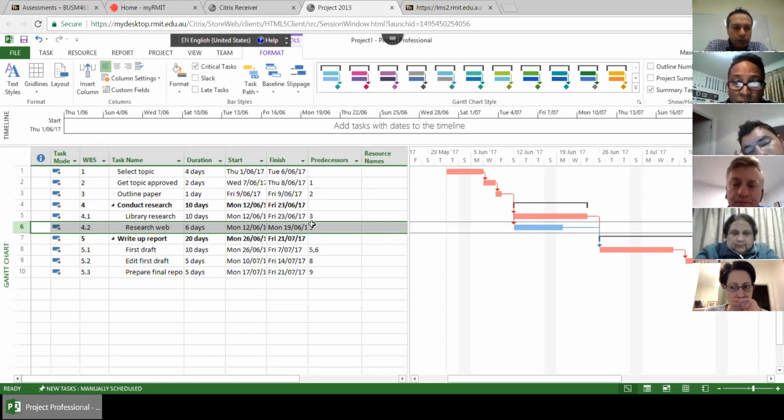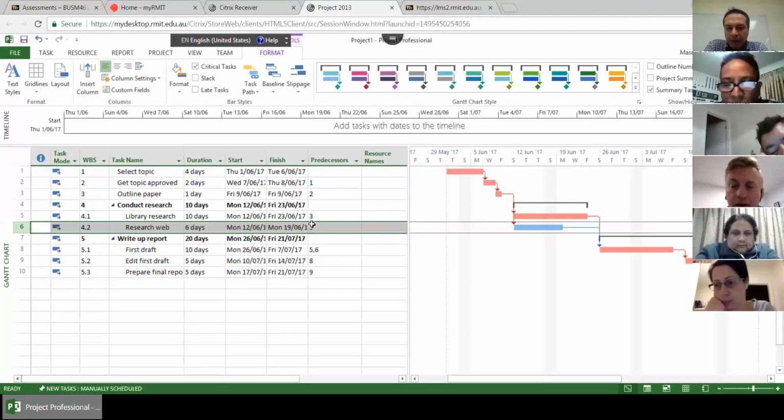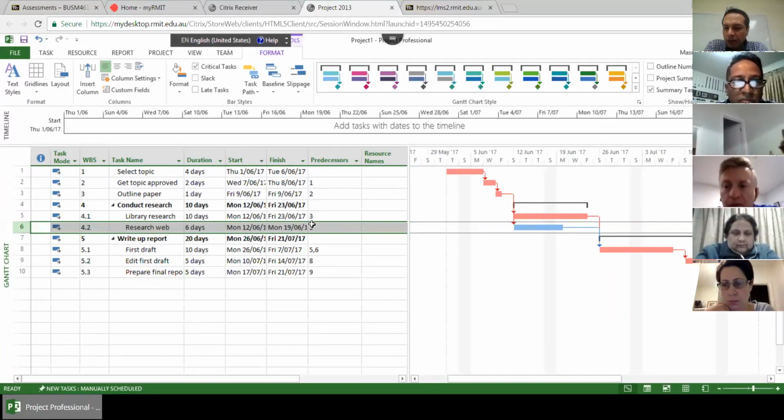in the projects that I was working on before, oil and gas projects, you mainly have long delivery items. For example, I was working on a compressor station project. The whole project was 12 months, but we had a compressor whose delivery time was 10 months.